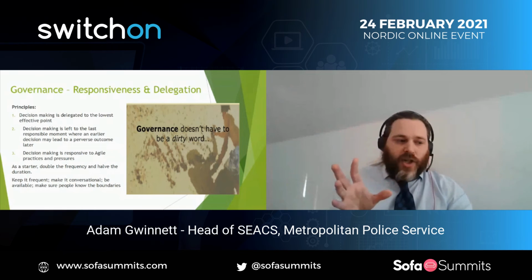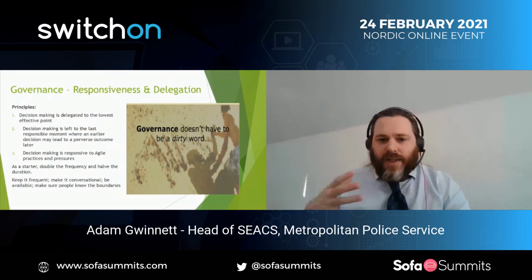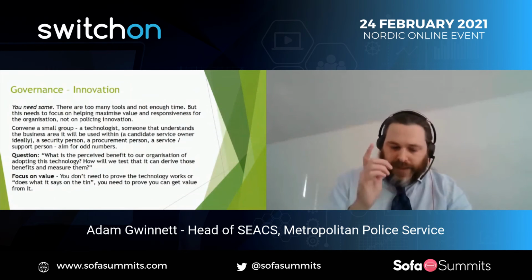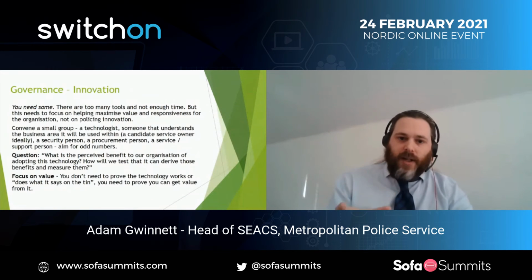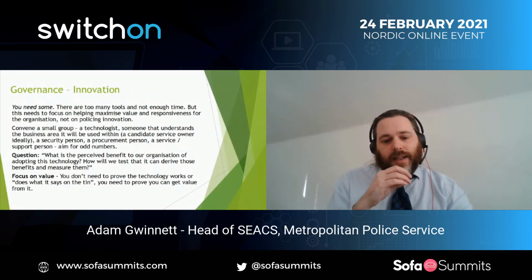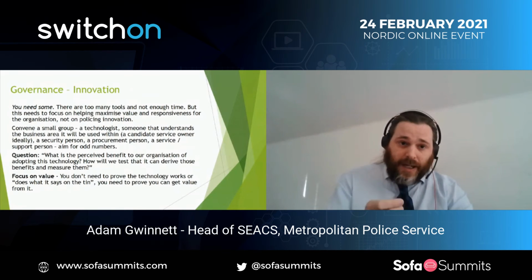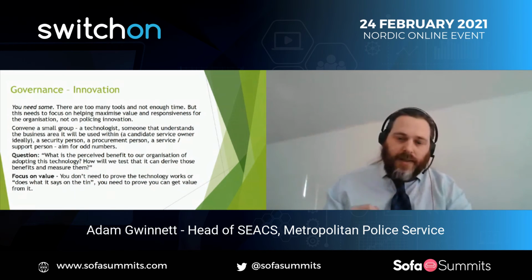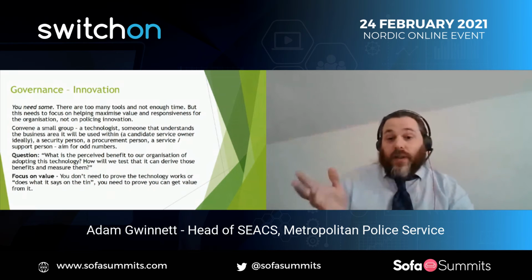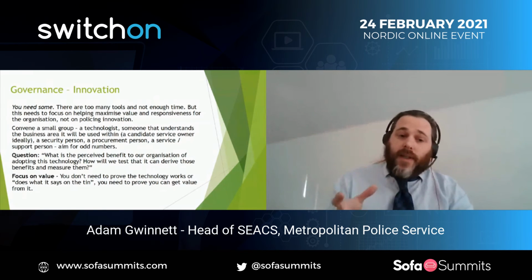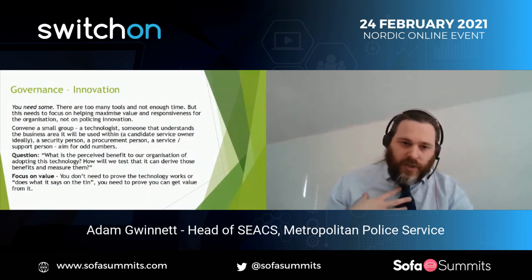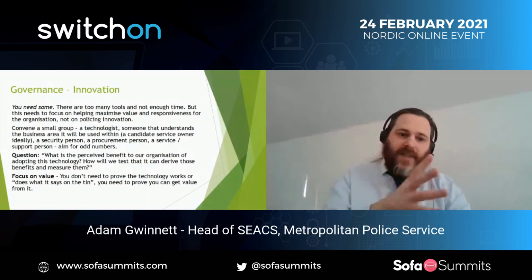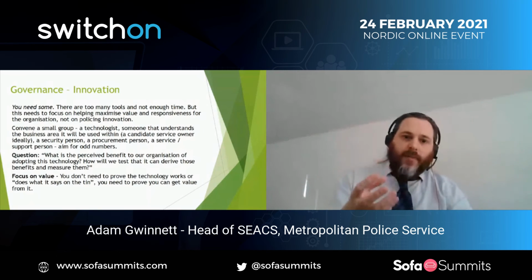And effectively we triaged it, and everything was marked as one of the 3 N's for us. So now, not yet, or never. Now is where you would say, yes, this is absolutely a thing of value and we should explore it and start on it. Not yet is where you would say, this is potentially of value, but now's not the right time for us to do this. We have other priorities or other pressures, but we should come back and revisit this in 3 months' time. Or never. And quite often the answer was, we don't think this is right for our organization. It doesn't fit with our vision. It doesn't fit with the purpose of the organization. Or given the pressures that we've got at the moment, whilst it sounds very interesting, it's not delivering us something that's essential now.